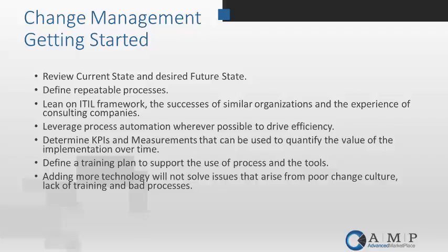Hey, Cheryl. And so one thing I wanted to add here is, we have people with different maturity levels when they come in to have a Cherwell change management implementation. And I think that the balance just needs to be there. We've had people that are so excited about change management processes that they have worked to define all of the processes and the roles and have pushed this out to the organization and at the same time implemented the tool. And it's a really difficult thing to introduce a brand new process and a brand new tool at the same time. And usually the tool ends up taking the black eye.